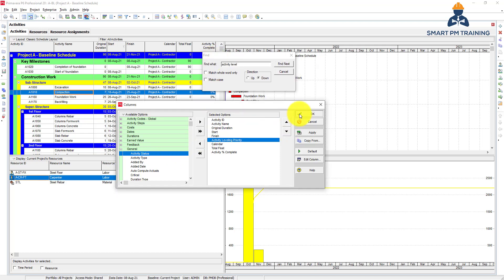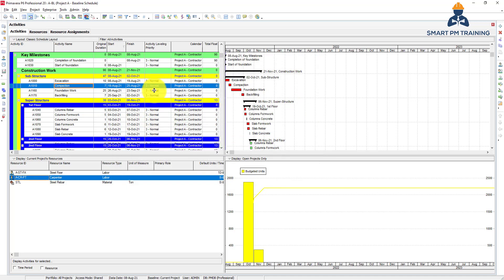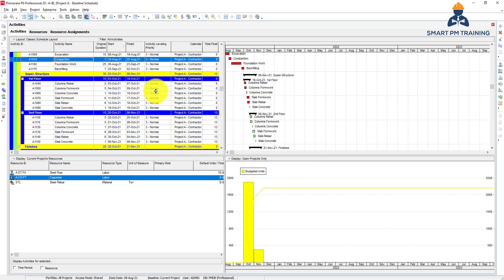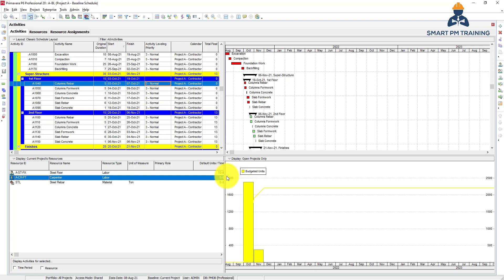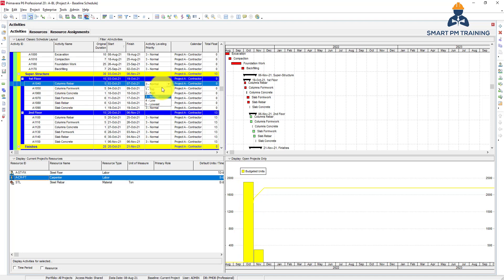I have all activities set to normal by default. Let's say rebar - maybe in my area, qualified steel fixers are very rare, they're not available. So I want to reduce the peak or reduce my requirements as much as possible. Instead of having all this high demand, I want to make all these activities with rebar a top priority for activity leveling.